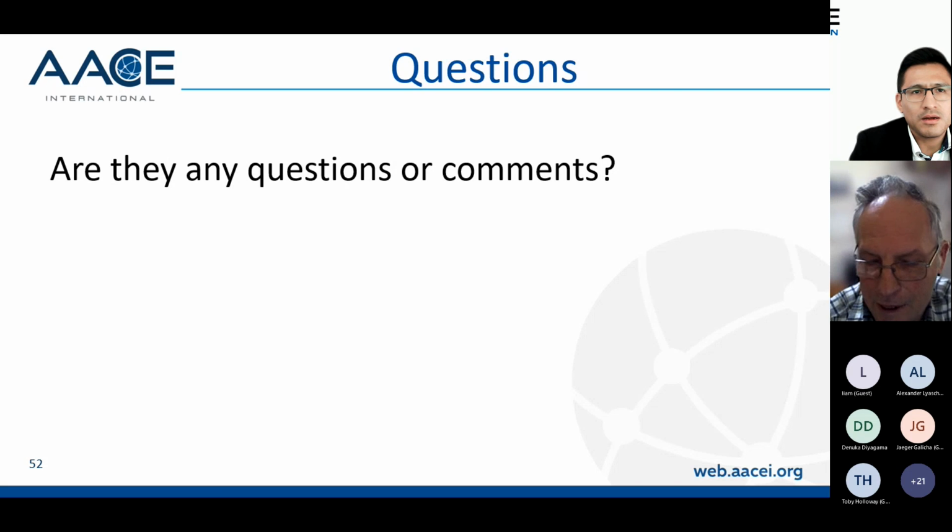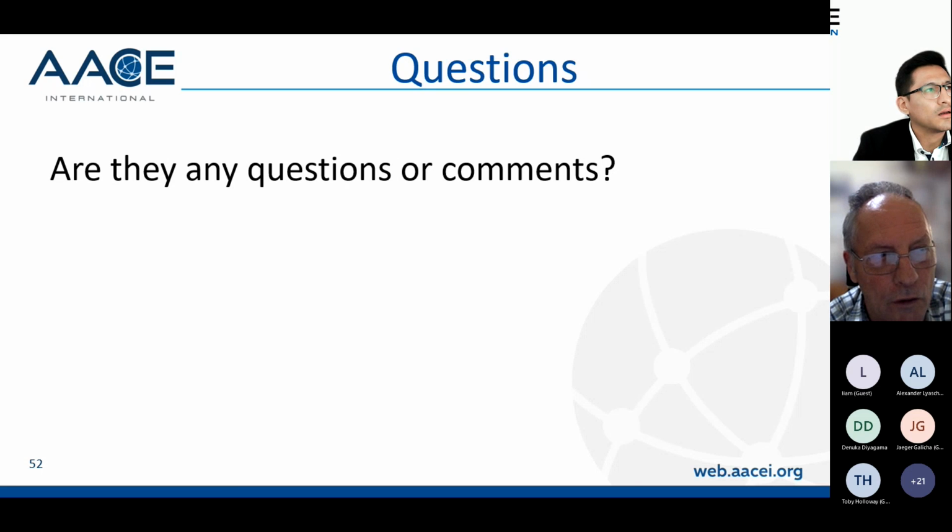Yeah, well, this is really difficult. What you're talking about is not really a delay to the start or in the middle where the work stopped and started. You're talking about it's taking longer. And the interesting thing is, therefore, what you have to be able to do is to ascertain the impact against the activities and say, okay, we've had a drop of productivity of 30, 40, 50%. And once you've recorded what the impact is, then you can impact the activity in the program.